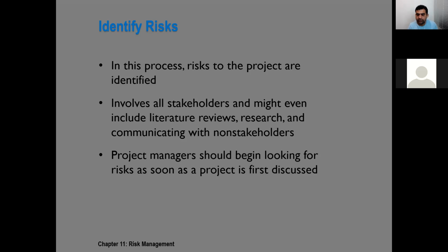We not only try to identify the individual risks, but the overall risk to the project. For that sake, we do many different activities. We talk with the stakeholders. We also do some research, some document analysis, literature review, or even sometimes talk with those people who are not even stakeholders just to identify the risks.